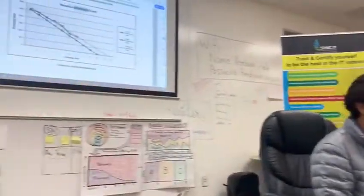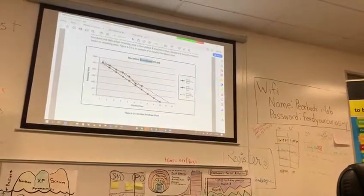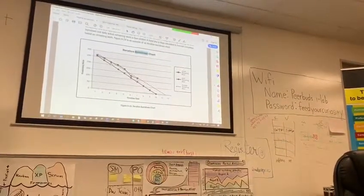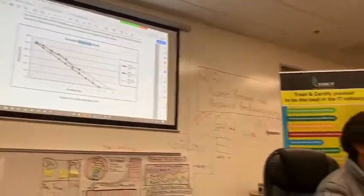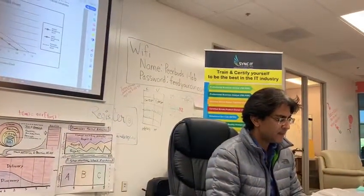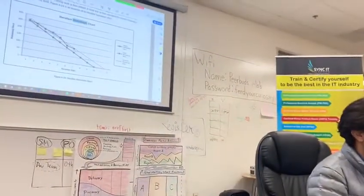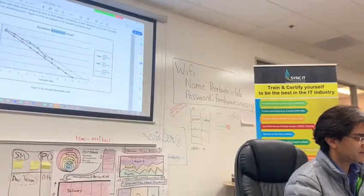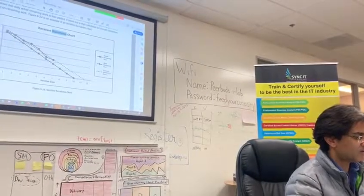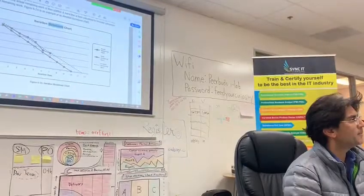Ideally, this is how it should look, but will you be doing the exact same amount of work every day? Not possible. Some days you'll achieve more, some days less. So in reality, your work may progress like this — sometimes more, sometimes less. This is the actual line: the amount of work remaining going down at a different pace than ideal.